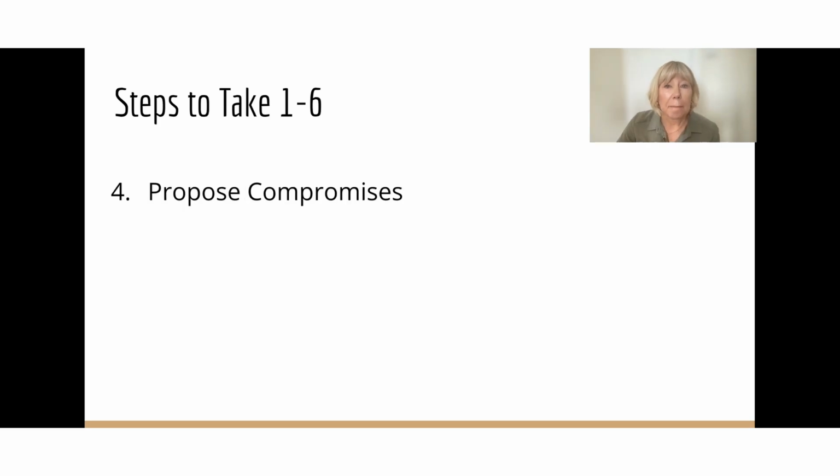Now that you have the impact documented, the fourth step is to propose some kind of compromise. Some of the options might be a phased release, as in not including everything in the first release, adding resources internally, or utilizing a third party. If you can get acceptance for one of the proposed compromises, you can replan and move forward.